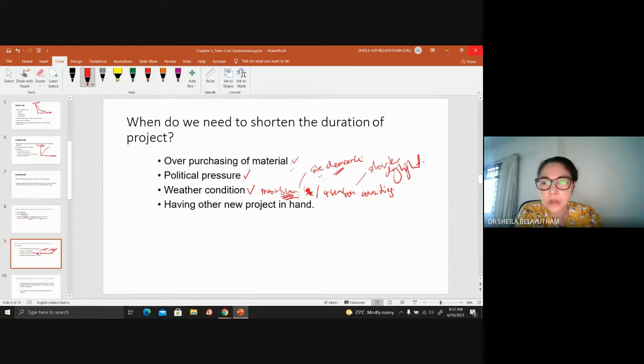So such as during winter, basically your daylight starts at 8 and by 4 it gets dark. Okay, so with that short daylight, it's quite difficult for you to conduct your construction as usual. Okay, so hence usually people will refrain from having their construction during the non-earthwork season too. So in order for you to do that, you need to kind of compress your production during the summer season. Okay, so weather condition affects a lot, but for us, not much on the four season.